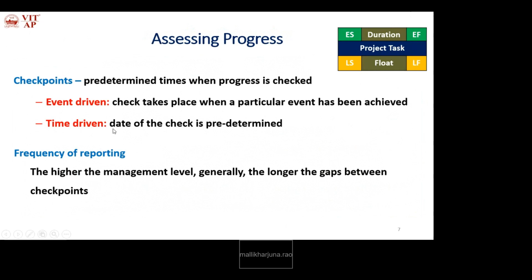And then time driven: the date of the check is predetermined. Before commitment, we have given a schedule, and according to that schedule only we have to finish. In that schedule we have given some review times, formal reviews. On those formal review dates we have to conduct reviews and know the progress of all lower level tasks, intermediate level tasks, and the final project.